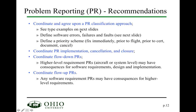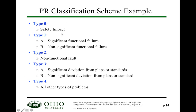For your problem reporting, you can classify various types of problem reports. One classification consists of four types: Type 0 is a problem report with a safety impact. Type 1A has a significant functional failure, or Type 1B a non-significant functional failure. Type 2 is a non-functional fault. Type 3A is a significant deviation from the plans or standards, and Type 3B a non-significant deviation. Type 4 covers all other problems. This is based on an EASA document on software aspects of certification.